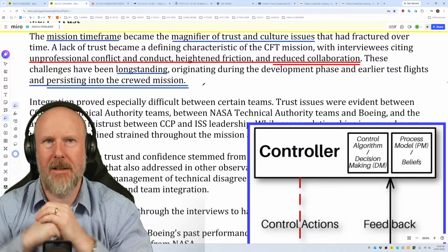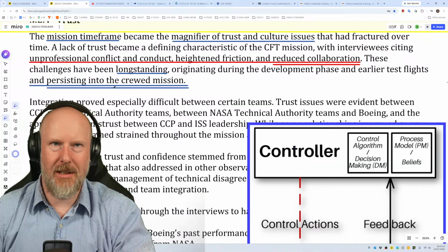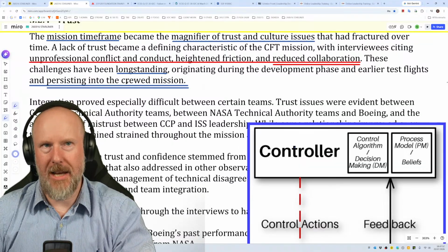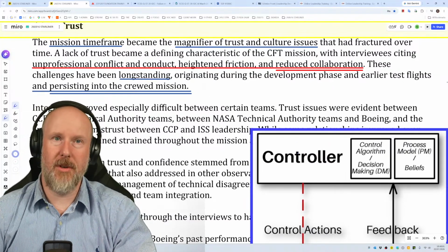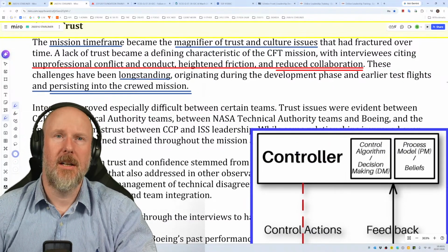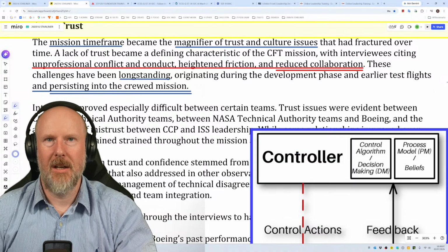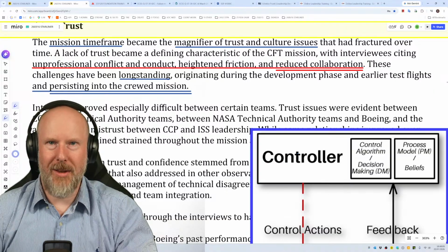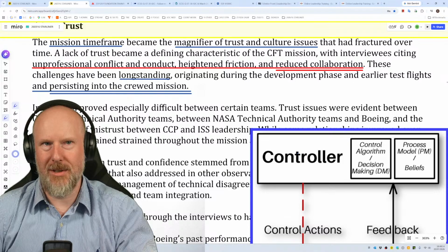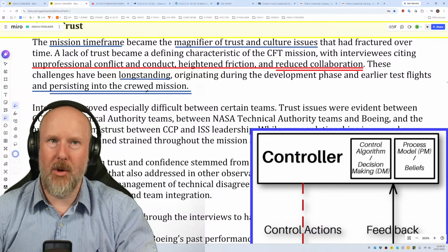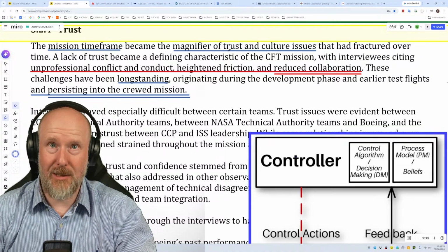And of course, you've got various flight readiness reviews and stage gate reviews. And I would suggest, if not already, go and do a review of those processes for those reviews and how they're conducted. Because I'm sure there are certain go, no-go decisions in those gates that should cover whether things are qualified or not, whether tests have been completed or not, whether the results are adequate or not. And of course, those gates, those milestones should also look at these aspects.